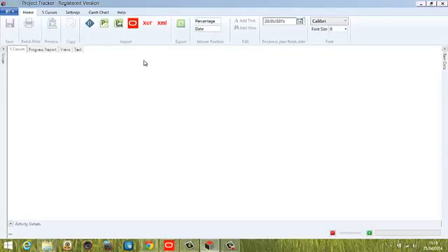Now from Microsoft Project and P6, if we were to go along the XER or the XML route, we do not need those applications installed on our machine. So providing you have the file, Project Tracker can import it. So very useful if someone sends you an XER file and you want to interrogate some of the data, you don't necessarily need P6 on your machine. So you can import your data, view your SCurve, look at certain activities, and run some of your analytics.